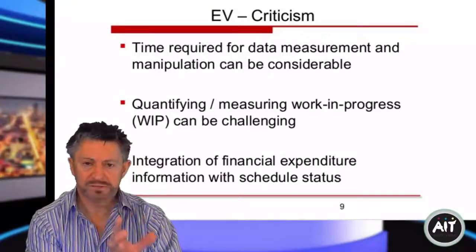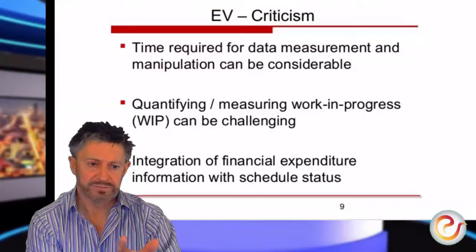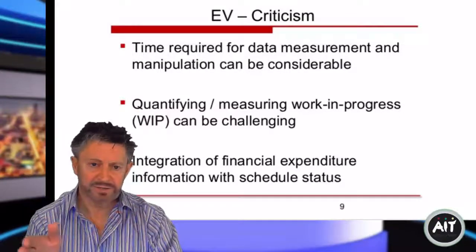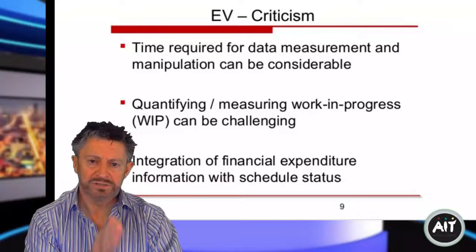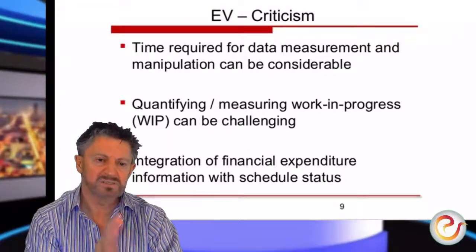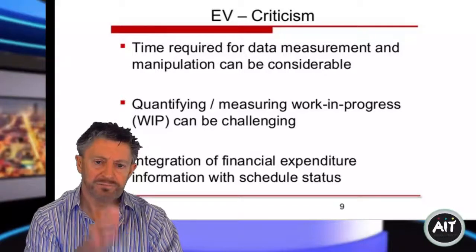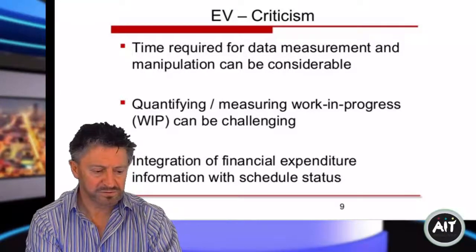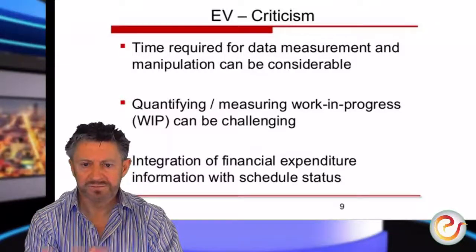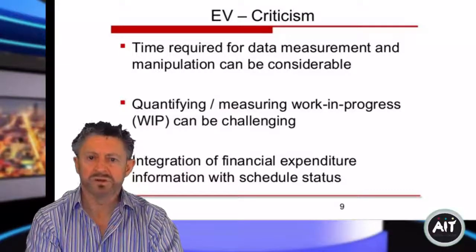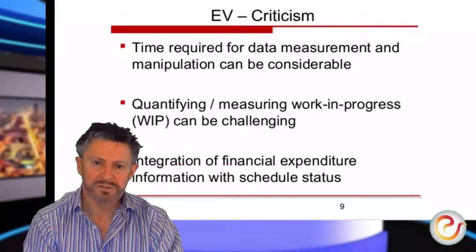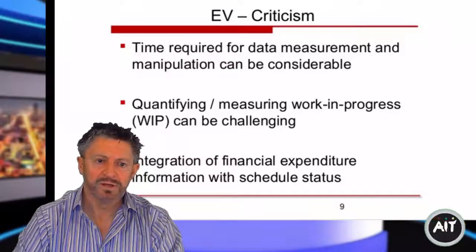If Mark is to take 30 hours over 3 weeks, that's 10 hours per week, you go down at the end of week 2 and check, is everything going fine, Mark? Yeah, and I'm about 60% there and so on. You'll take the hours. 20 hours out of 30 hours, I'm 66%. I'm at 2/3 of the way through. Therefore, 2/3 of the task must be complete based on my time recording.